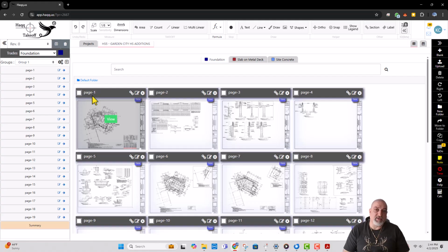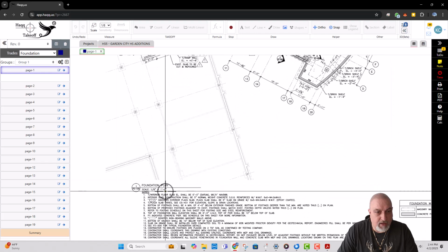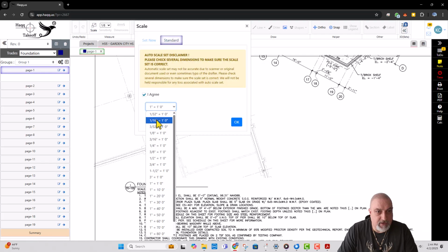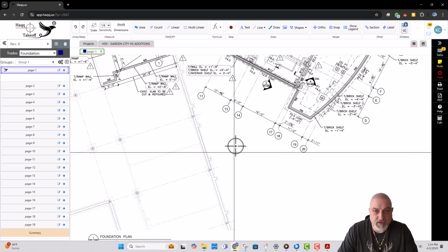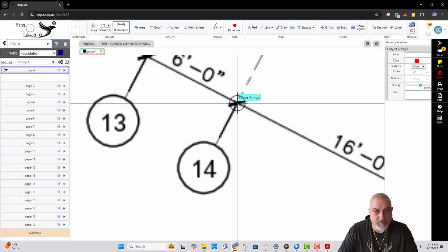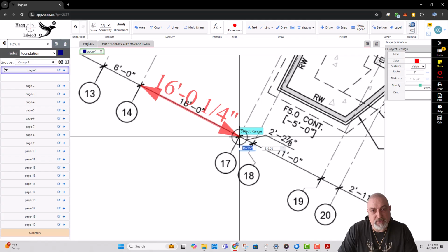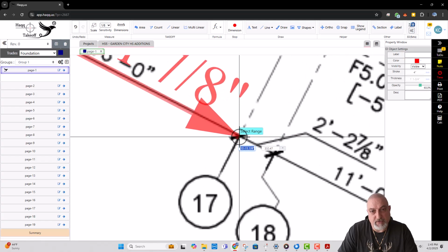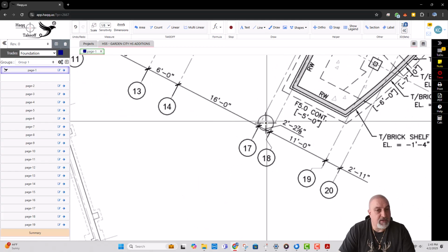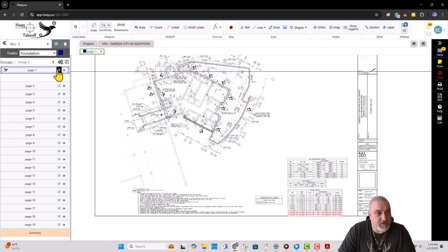And in this case, today is the hard day. No name came. Okay, no problem. We do it manually. Let's set the scale first. It says 1/8 here, and we check the dimension so we make sure the scale is working properly. And it's giving me 16 1/4. If I zoom in, probably I'm gonna get 16 exact. Yeah, perfect scale. Okay, and this page is called FO100.